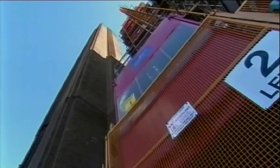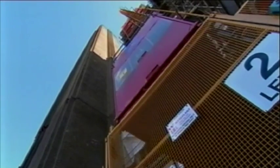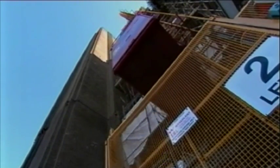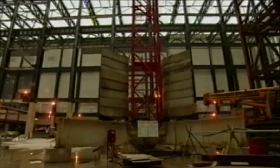Rowan tries desperately to speed up the work. They know they are in trouble and don't try to hide it. I mean, the way they've reacted to it has been exemplary, really. They put in two extra cranes. They're up to, I don't know, 80 or 90 guys on site, which is probably double what the tender allowance is. So they've not sat back and tried to defend this indefensible position. They've said, hands up, and thrown resource at it. So for that, you've got to commend them.